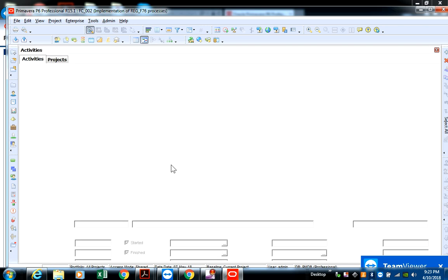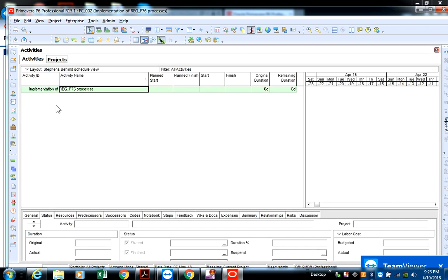Finally. Okie dokes. So what we have here is the activities layout window. Okay, as you can see, all you have is the project that we've created, but we've got no activities within the layout spreadsheet. So as I said with the sequence earlier on, the sequence is EPS, project, WBS, activities, which represent the smallest subdivision of a project. Okay, the smallest subdivision of a project. Now, in order to understand that, I'll come to that in a second. We'll go first of all to create a WBS.